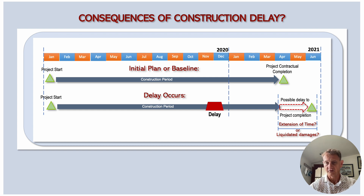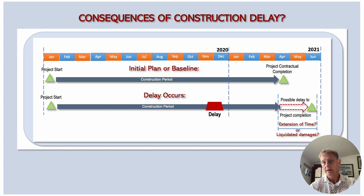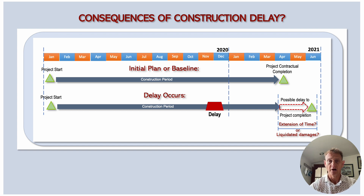Why is this important? For owners, it's important to have the project completed by a specific time — if it's not completed there might be damages, for example loss of rental income. For the contractor, it costs money to operate construction on site, so being there longer than planned means additional costs. Most construction contracts include a provision for liquidated damages to protect the owner against the risk of the project being completed later than planned. In essence, if the contractor does not complete the project in time, they would need to pay a certain amount to the owner for damages.